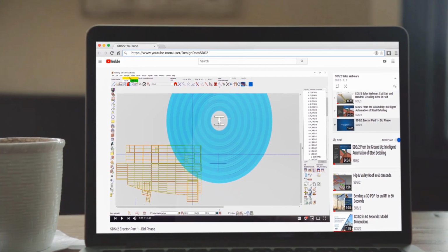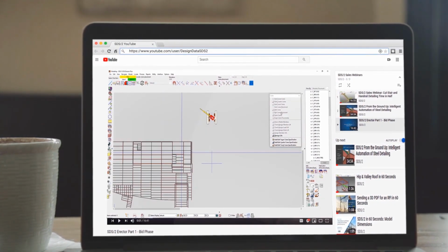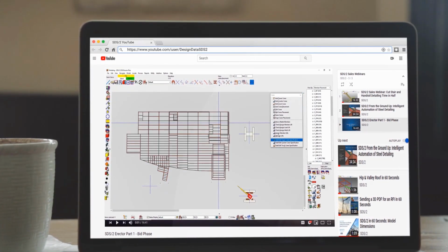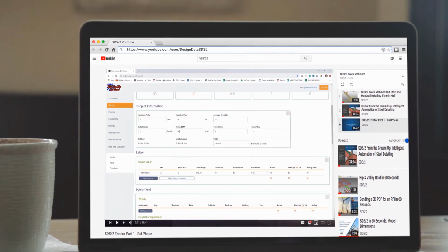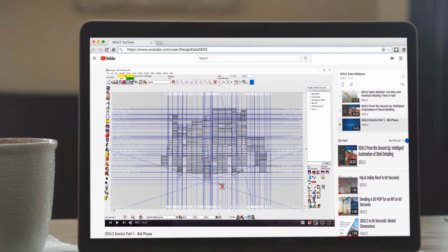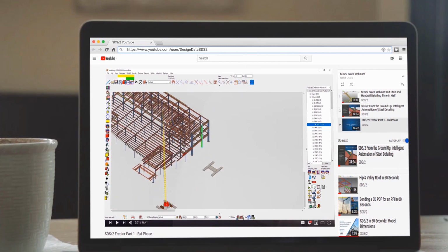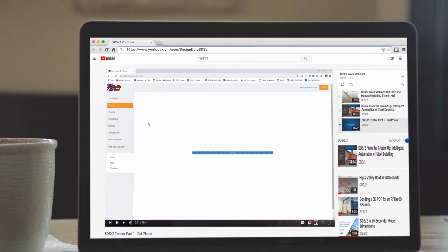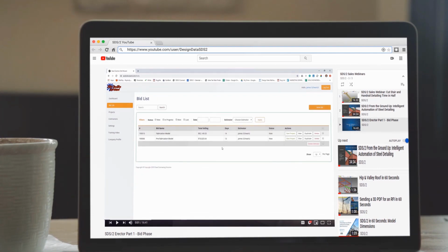To briefly summarize my first webinar, I was able to take my prefabrication model that was located inside of Revit and bring that information inside of SDS2. I could see what type of members could be liftable and placed with the cranes I wanted to use for this job. I could send that information out to BidWizard for the prefabrication model, and then compare that with my fabrication model inside of SDS2. With that information, I could see what my heaviest members were, if my crane placements were correct, and send that information to BidWizard as well, and compare the two to see how far off I was.